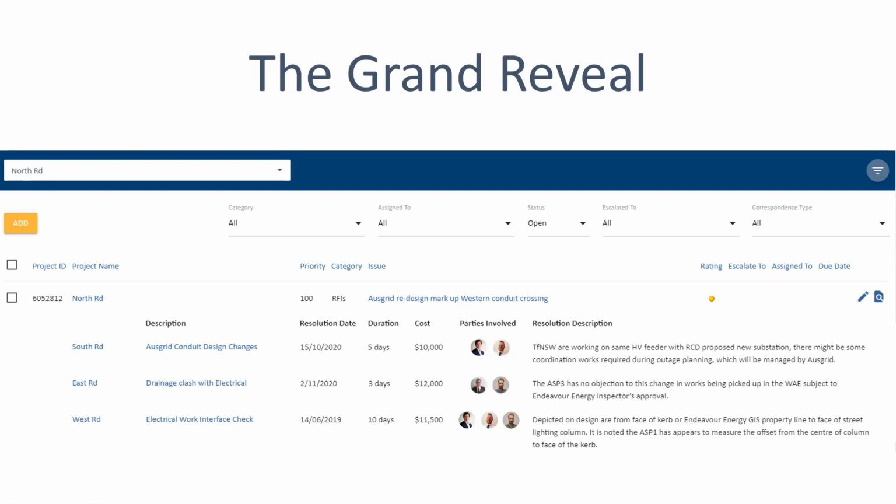Broader ones will be when you create a new project and you describe that project with a bunch of metadata and commentary. You can then, when you've created it, use similar projects to create an estimate for your services, create an overall budget estimate for the client that's in that project, a schedule timeline along the life cycle phases, what milestones are normally used to track that, what earned value stage gates, etc. So you'll get an interface that will reveal all the common things you'll need to do on that project, even though you've only just created it in the system.